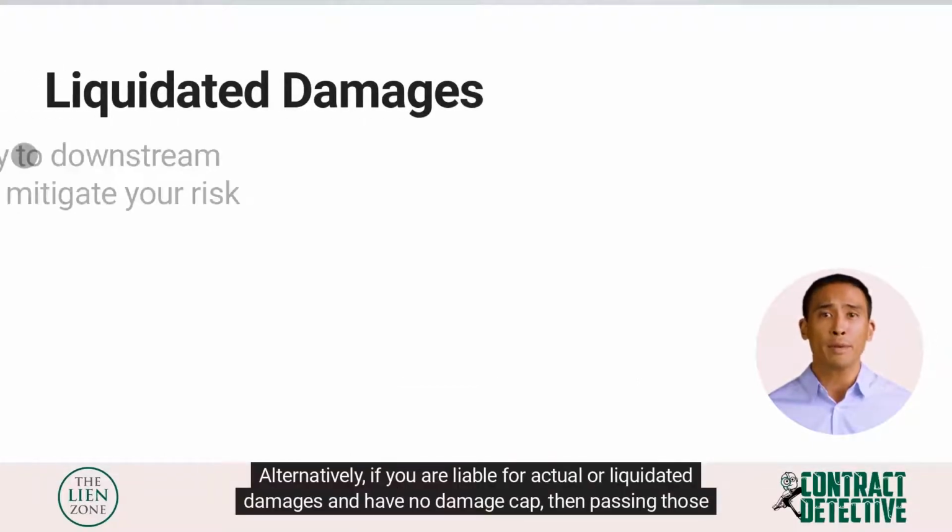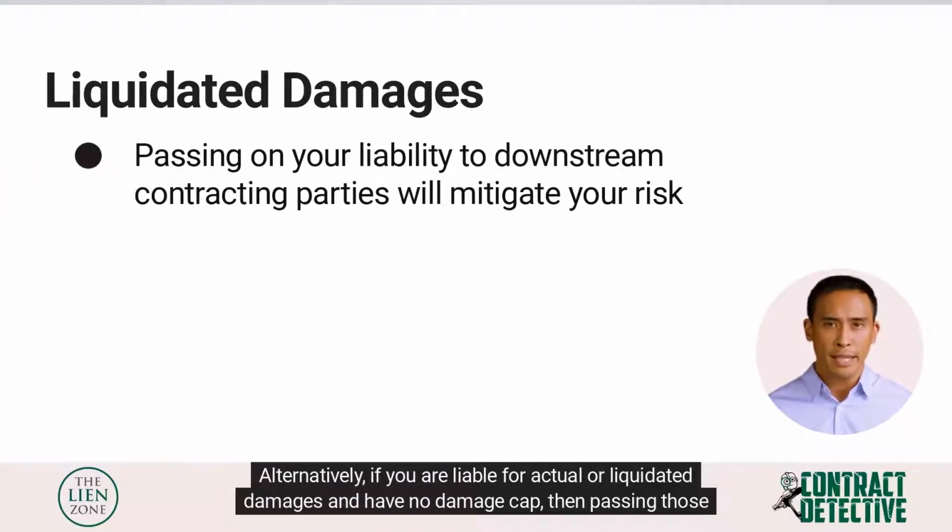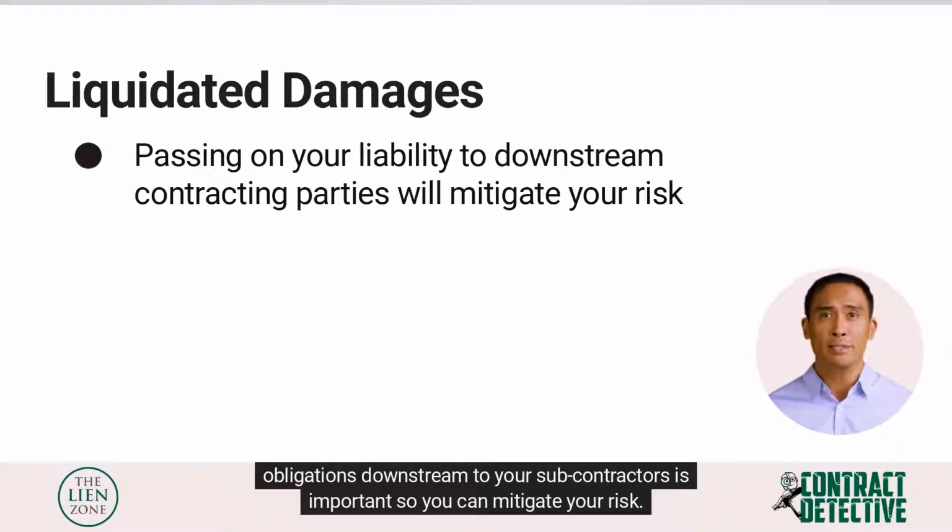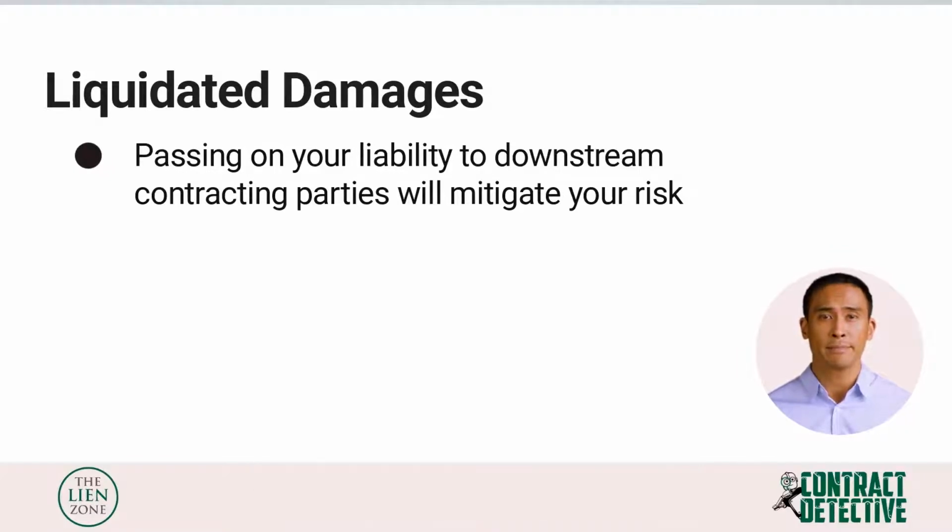Alternatively, if you are liable for actual or liquidated damages and have no damage cap, then passing those obligations downstream to your subcontractors is important so you can mitigate your risk.